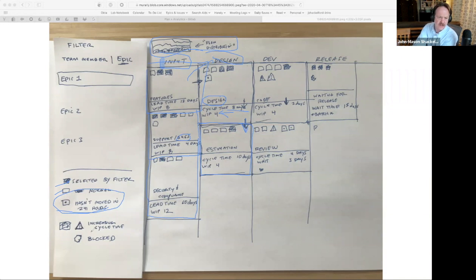And then I've got another one here for indicating increased cycle time. And I see that here in my review bucket. This item's for review. And I really care about items that are approaching the average cycle time for items in that area, so that if we don't move that on quickly, our metrics are going to start looking worse for this particular stage.